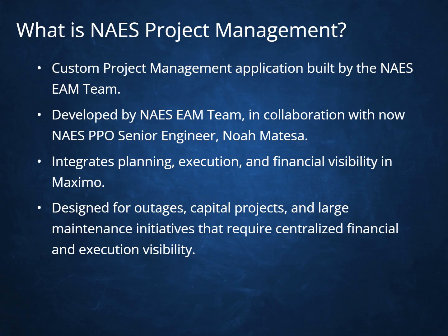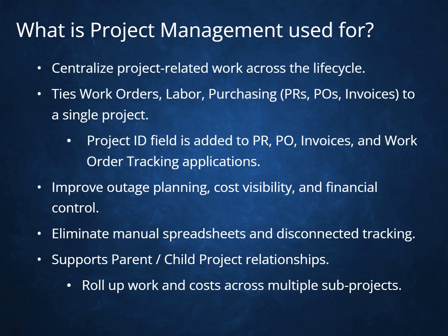It is designed for outages, capital projects, and large maintenance initiatives that require centralized financial and execution visibility. What is project management used for? It centralizes project-related work across the lifecycle. It ties work orders, labor, purchasing, PRs, POs, and invoices to a single project. A Project ID field is added to the PR, PO, invoices, and work order tracking applications.